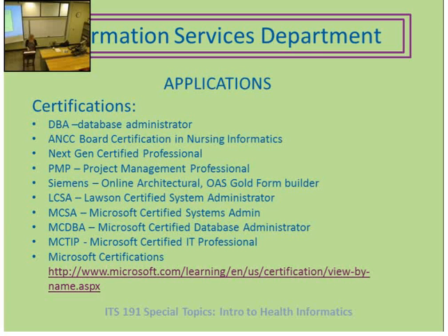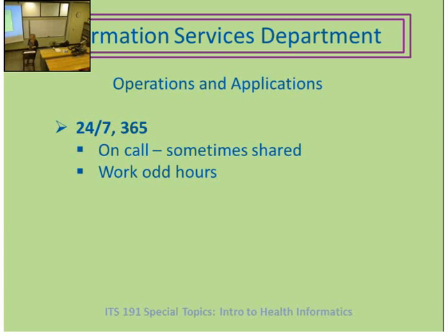The IT department's 24/7, 365. In most places, even in business, regardless if it was healthcare related, what's unique about a healthcare environment with an information services department is we can't just plan to do downtime at 6 p.m. because the offices are closed. We may still have somebody in surgery. We may have somebody in surgery at 3 a.m. if they've come in from a bad car accident.